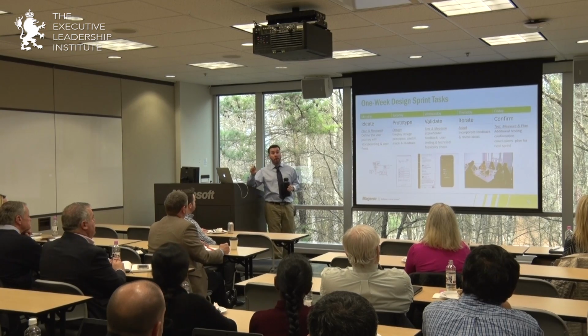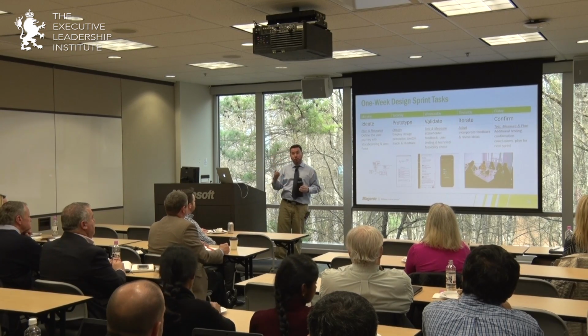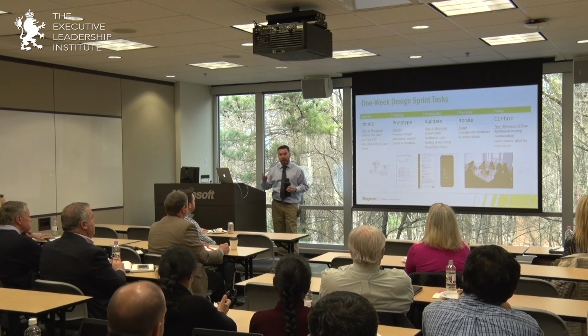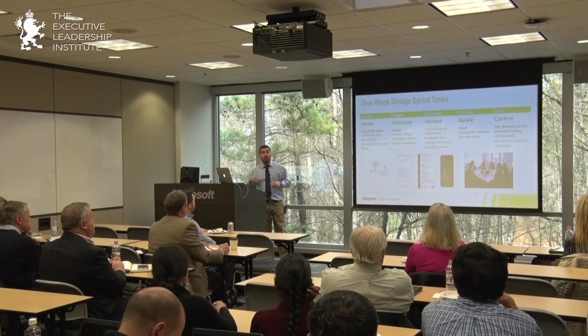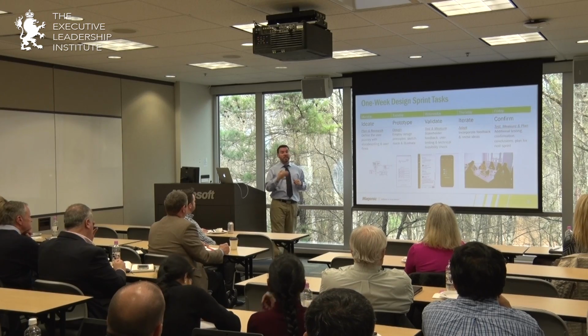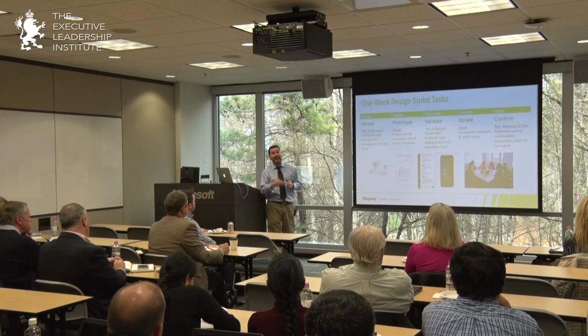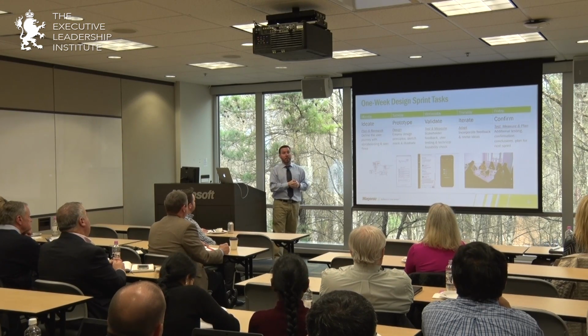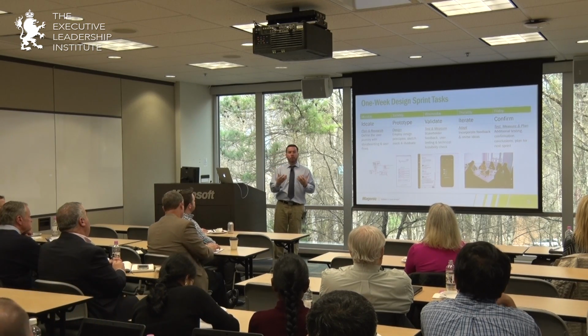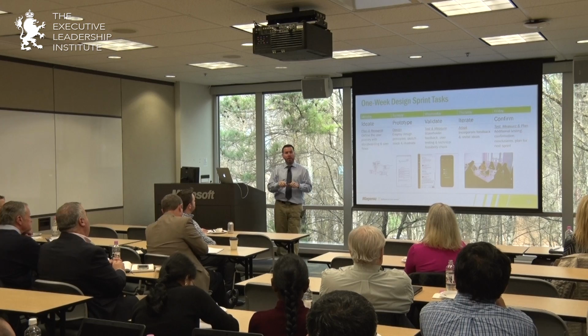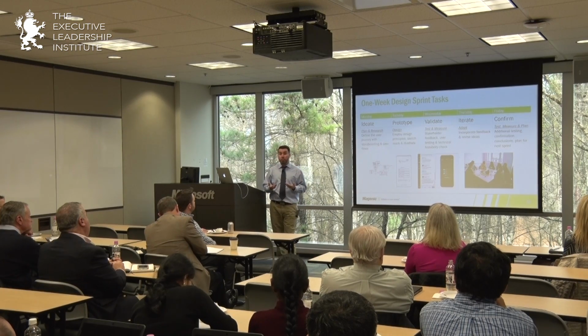Okay, from sprint 1 on. One of the things that we like to do, and we'll talk about this when we talk about best practices and lessons learned on the next couple of slides, is it's sometimes advantageous to get maybe a sprint or even 2 sprints ahead of development. So now when the developers are getting in and looking at their backlog items, it's not just a question of here's what I need to code and I can start writing code. There's additional inputs into their process as well.